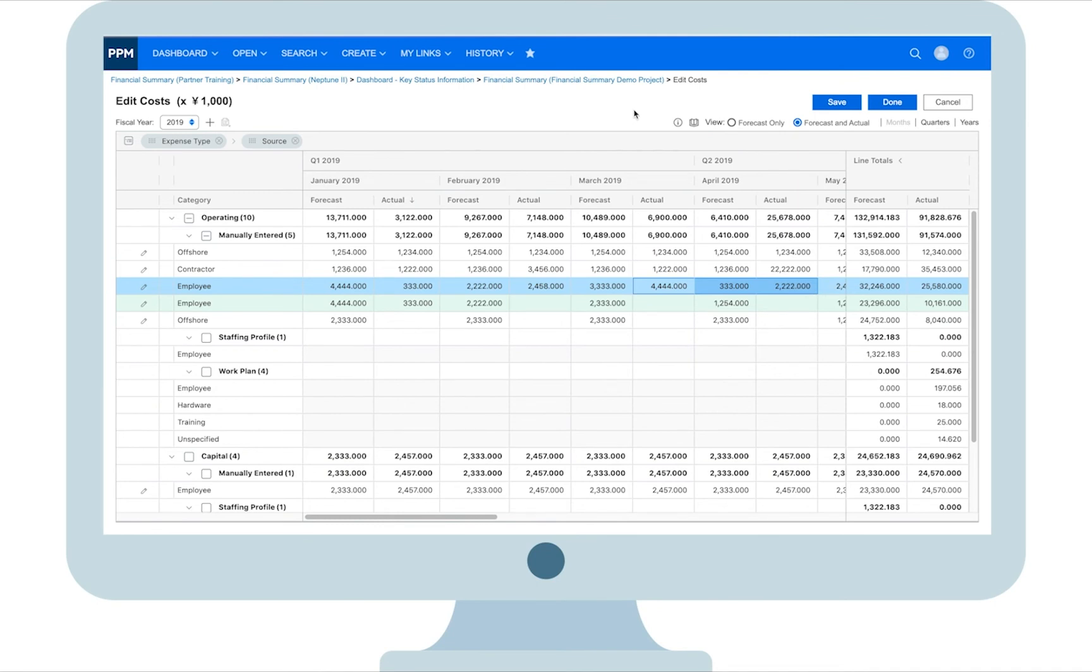In a certain phase of project execution, for example the project auditing phase, you may not want financial managers to edit costs of the past months. To protect cost integrity, PPM enables you to control whether or not to lock the costs of the past months, when to lock them, and who can adjust locked cost.